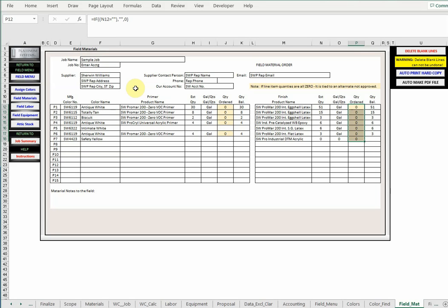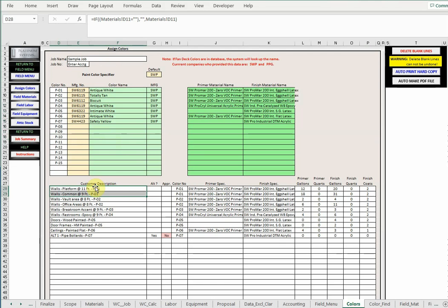So make sure that you take advantage of the color numbers. We take a look back here from the takeoff. All you do is put in those 4 characters at the end of each line to designate which paint it's going to be, and then this system becomes a tremendous tool for you.